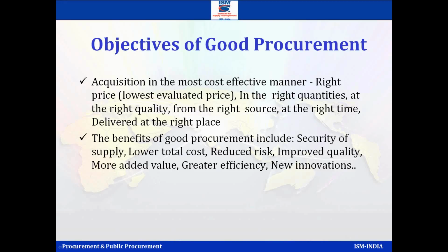Lower total cost. The word is lower total cost. It is not the purchase price alone. It is all the costs which add to it. It could be shipping cost, insurance cost, operational cost. All those you have to add up. Less risk, improved quality, more added value, greater efficiencies.